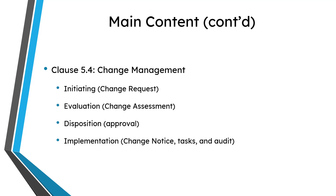Clause 5.4 is a big part of the content because that covers change management, and there are four sections to it. It talks about initiating a change — if you're familiar with other configuration management standards, this is where you would be talking about a change request. Then it goes into evaluating the change, which is a change assessment, for example in CM2.